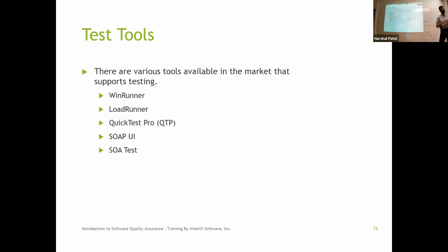So you mentioned reading the requirements document. That's a fixed activity. It may vary a little based on the size of the document, because it will take you more time to read a 500-page document versus a 50-page document. But you will have a good idea that it's going to be fixed no matter how many test cases I write.